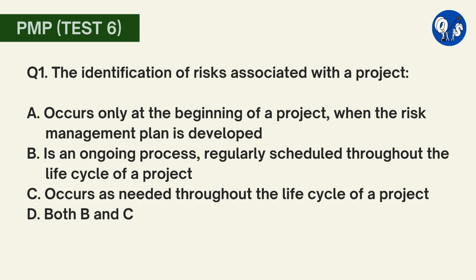Risk analysis is not limited to the beginning of a project's life cycle when the risk management plan is developed. The risk management plan should include a tool for risk assessment as a continuous process throughout the project. Risk reassessment should be a scheduled component of the project but should also have the flexibility to occur as needed at greater or lesser intervals based on the level of risk.